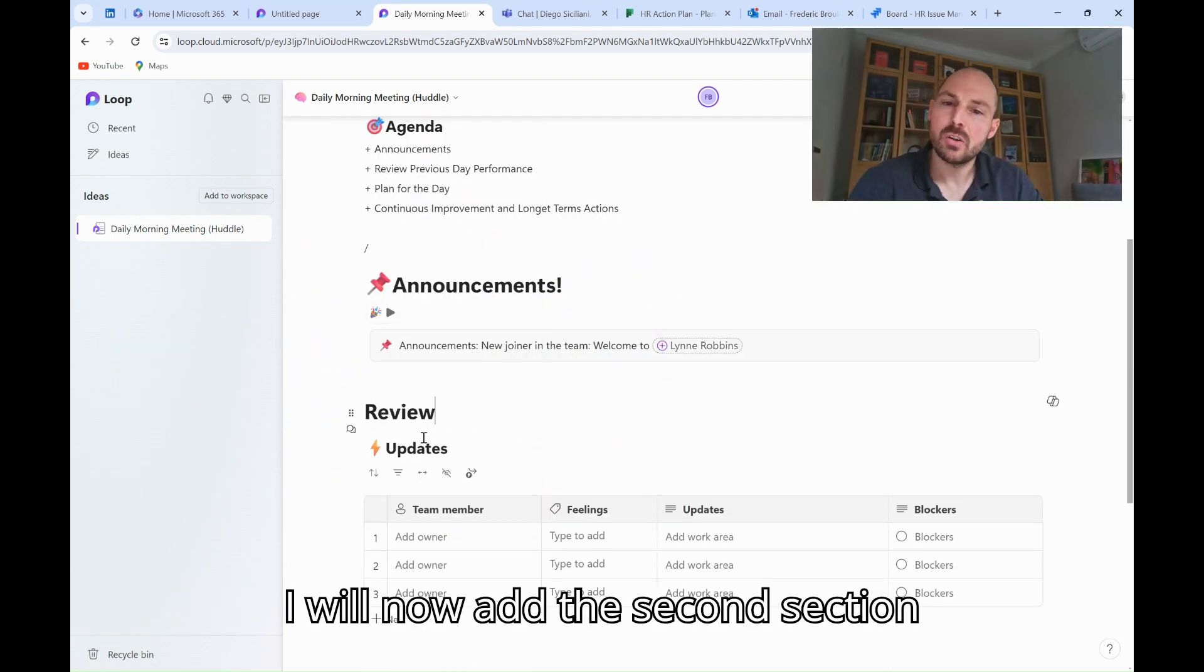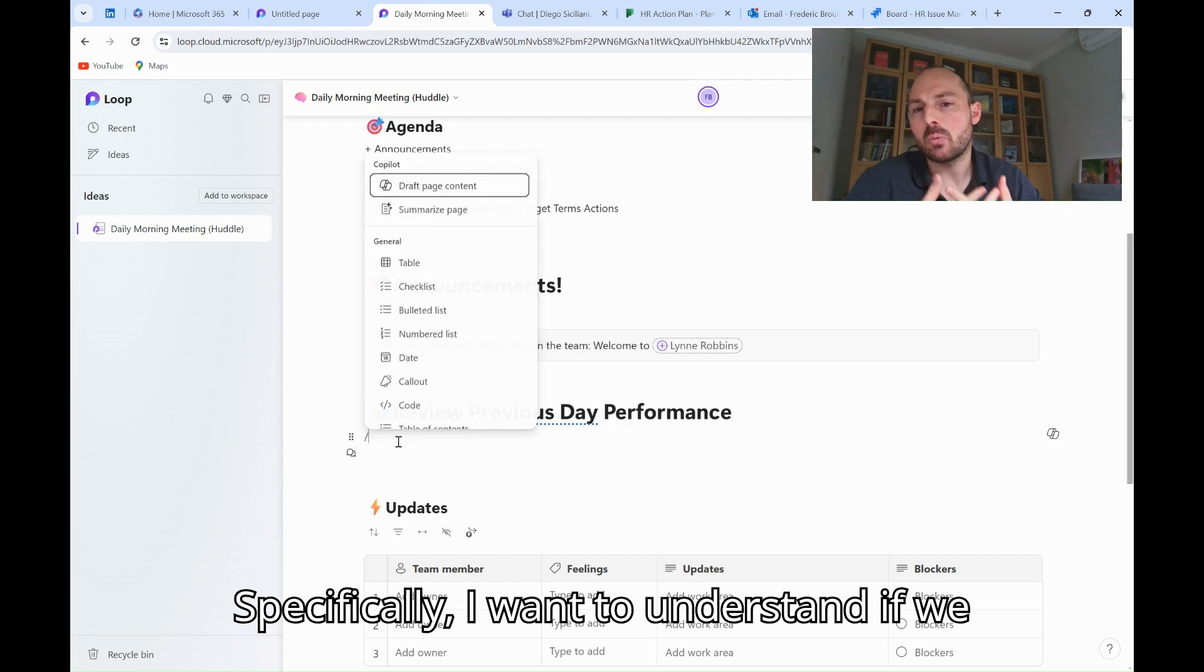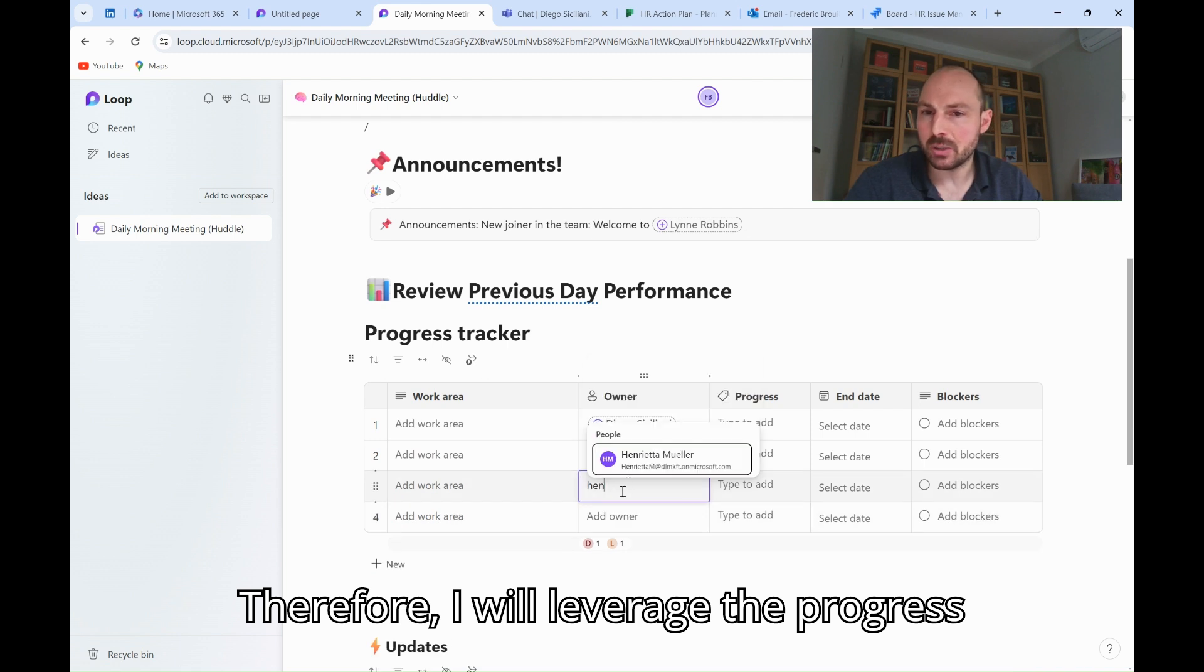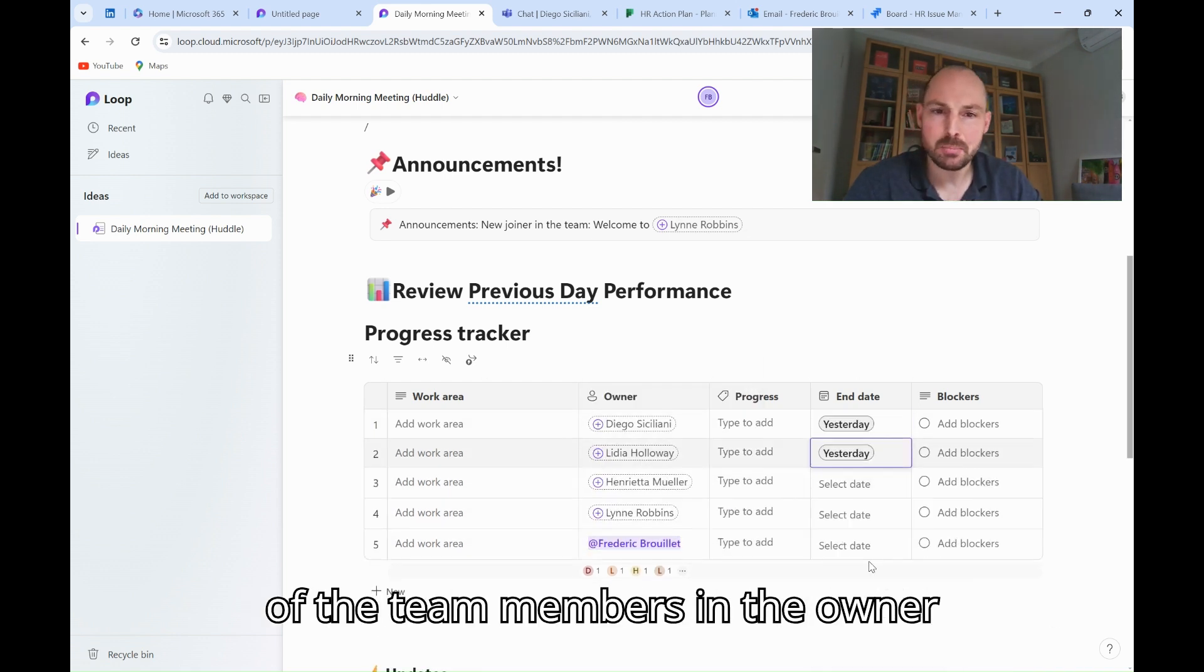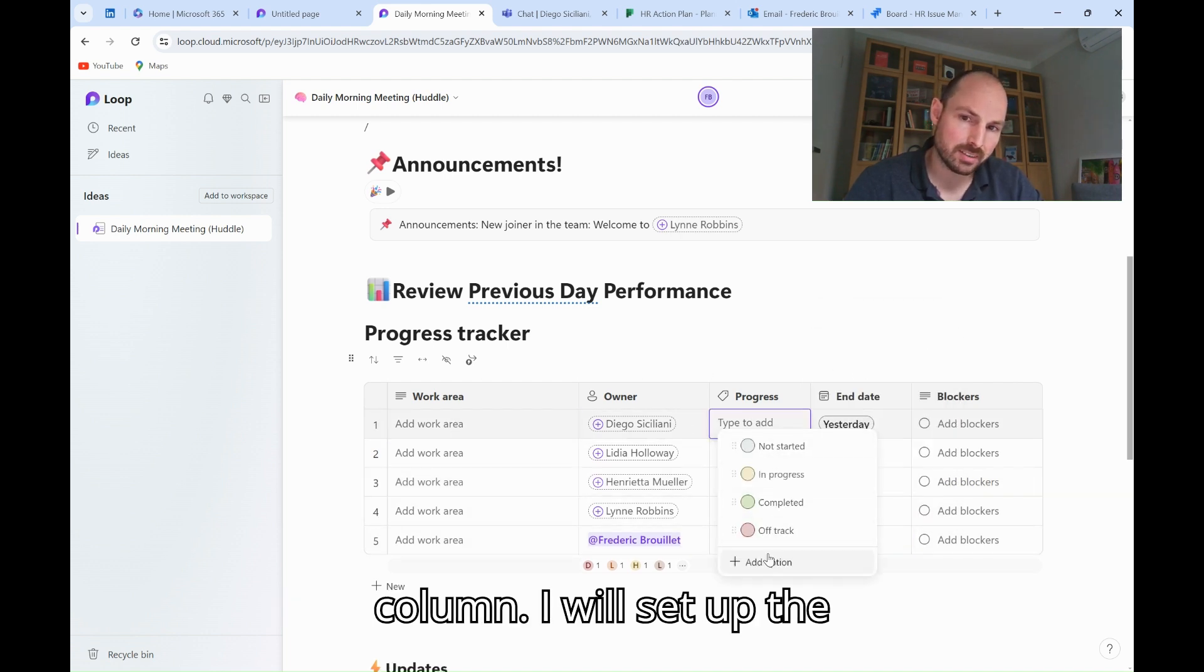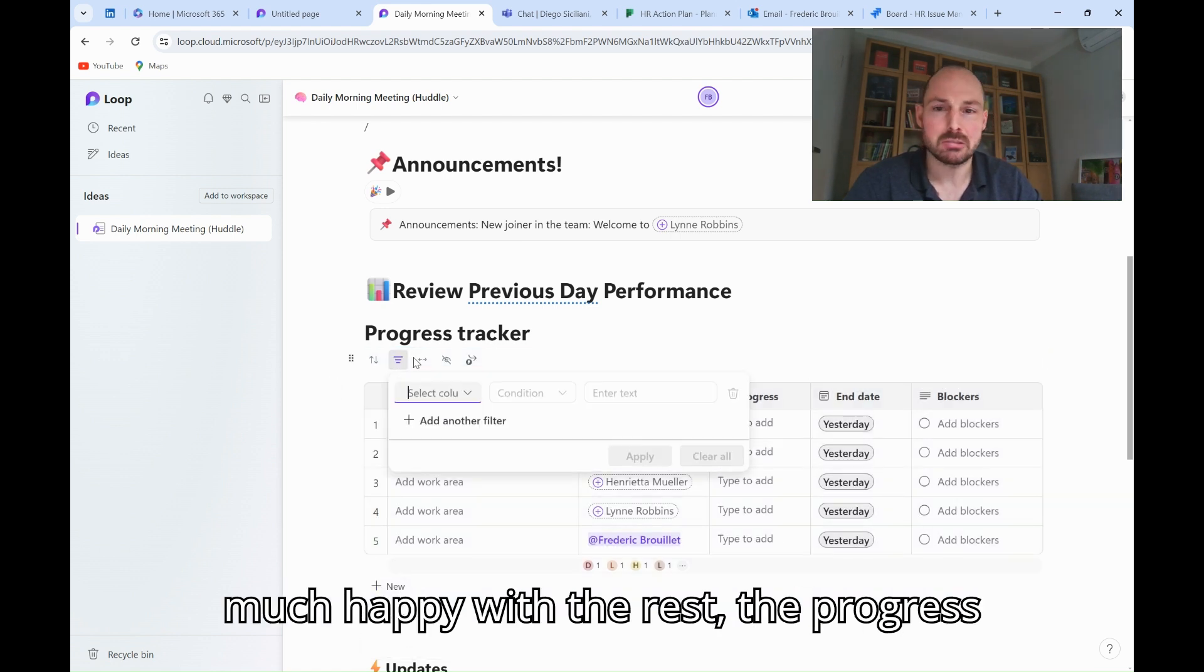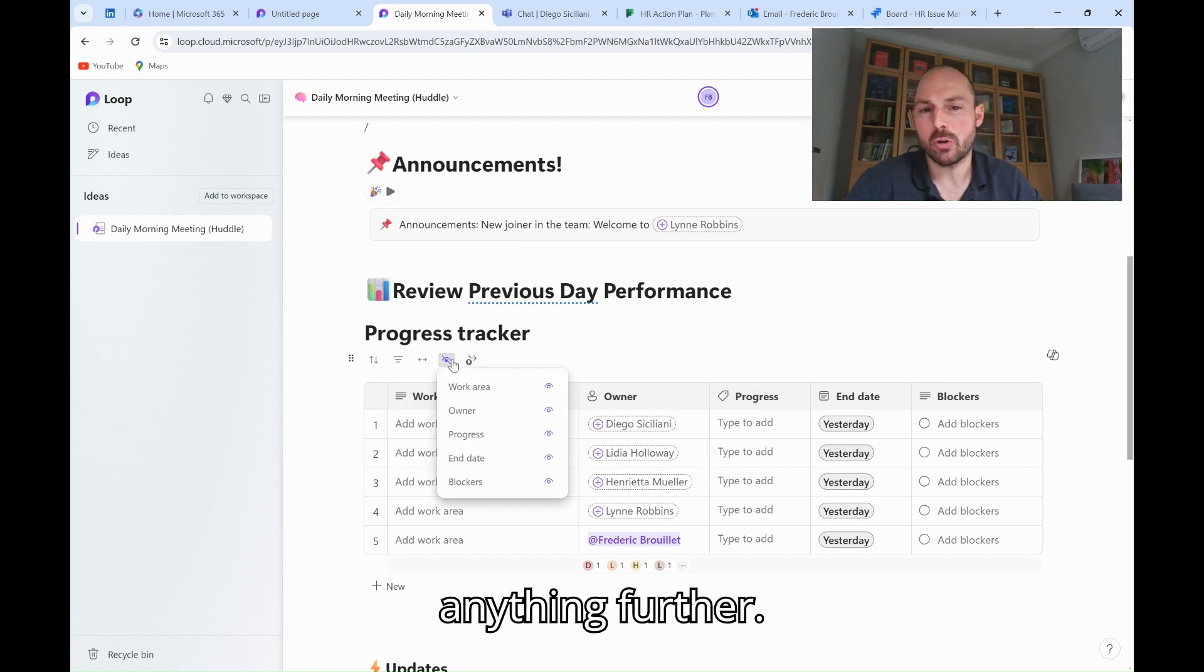I will now add the second section, review of previous day performance. There, specifically, I want to understand if we have achieved our objectives yesterday. Therefore, I will leverage the progress tracker block, and I will add each of the team members in the owner column. I will set up the end date as of yesterday, and I'm pretty much happy with the rest, the progress status, etc., and I will not change anything further.